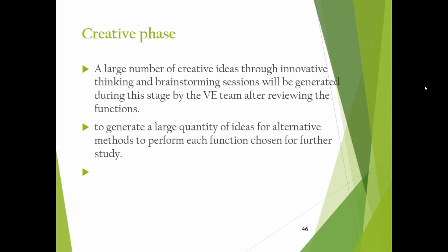Okay, so ideas will be generated by the value engineering team. Now they collectively do the brainstorming and come up with creative ideas. After reviewing the functions, the aim is to generate a large quantity of ideas for alternative methods to perform each function chosen for further study.